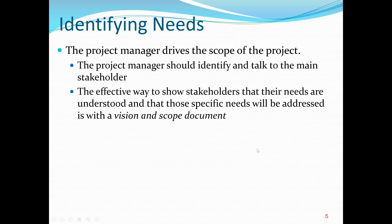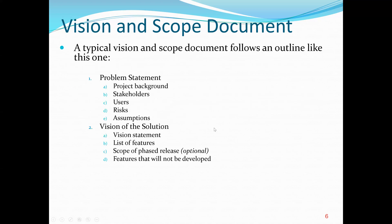As a project manager, you have to drive the scope of the project. The project manager should identify and talk to the main stakeholders. The effective way to show stakeholders that their needs are understood is with a vision and scope document, which is very important. The main goal is to avoid scope creep — adding more features, sometimes unnecessary ones, which would cost more money and take more time.